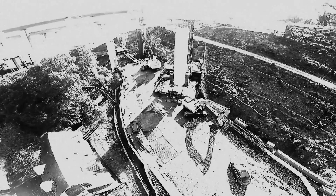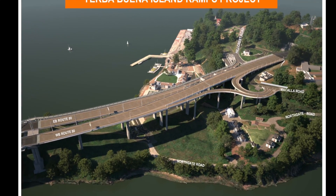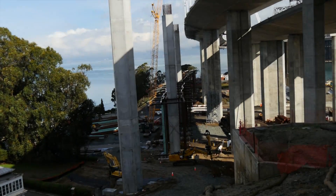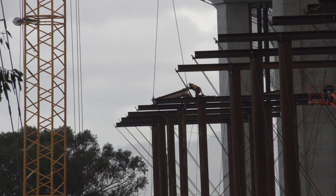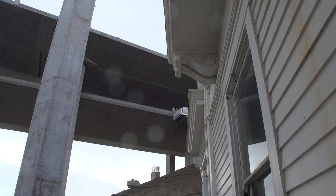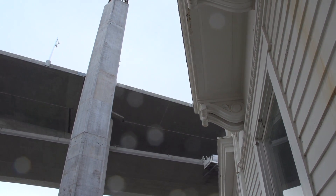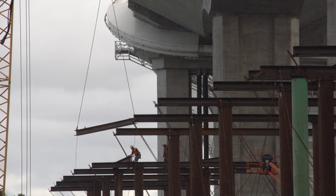The San Francisco County Transportation Authority is clearing the hillside on the north side of the bridge for a new westbound off-ramp and a new loop westbound on-ramp. Many of those new north side columns have already been poured and crews 150 feet up are building false work — basically a supporting framework. They'll attach false work to the columns until the deck is poured, and then all that stuff will come down.